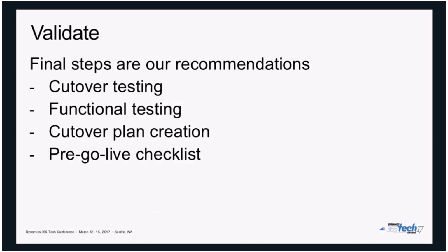After that's done, you have to run it multiple times to ensure that all the times are correct and you don't have any surprises during the actual go live. And go through the pre-go live checklist to ensure that everything has been validated and you don't have any last minute changes within your checklist.